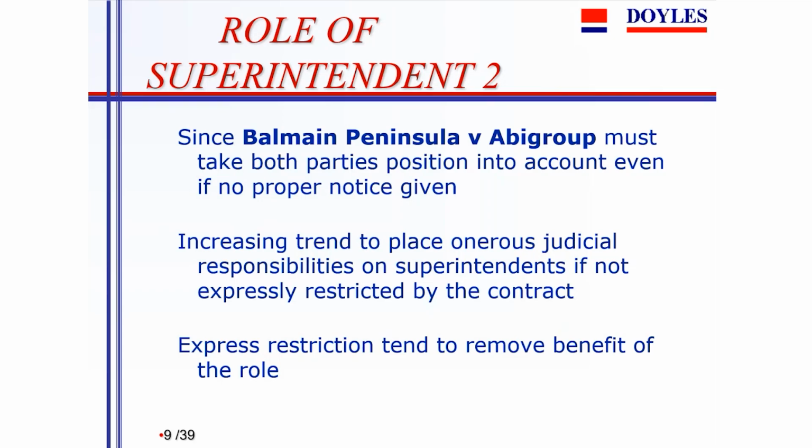Increasingly, though, the issue became one where, by virtue of the conditions of contract, the opportunity for the superintendent to be even-handed has been written out. So it's an important aspect and important measure of the contract, first off, that you look at the superintendent clause and see what role the superintendent is playing. Is he an impartial certifier, a bit of an umpire, or is he really just doing what the principal tells him? If we go to the next slide,